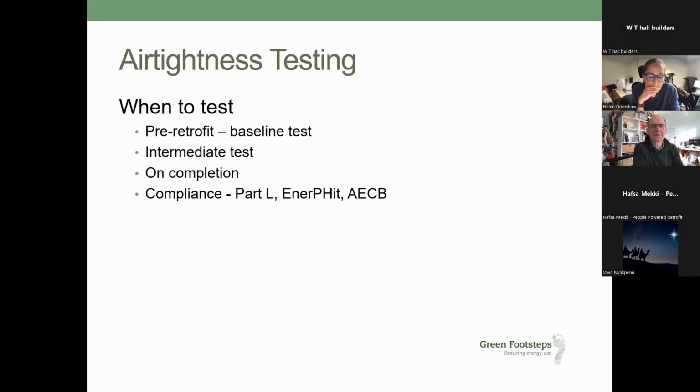So, when to test. I mentioned pre-retrofit. I think that's a really important time to look at it, because then the client is spending their money wisely and knows where they're working from. In terms of good project management, I'm an engineer, and a key thing from my point of view is you won't get where you want to get to unless you know where you're starting from.